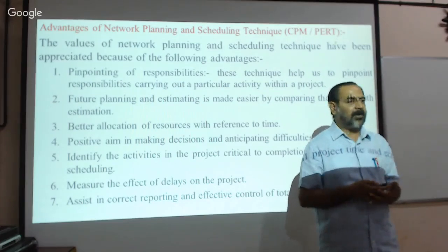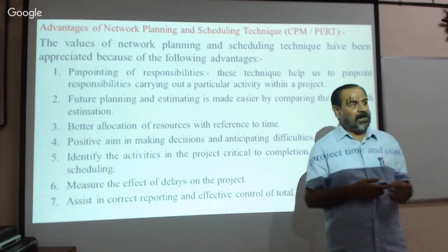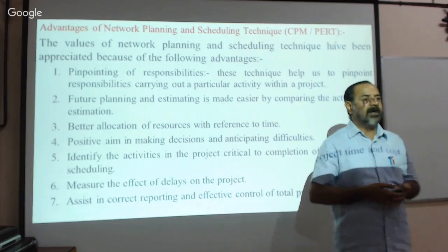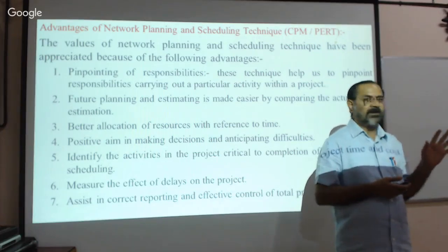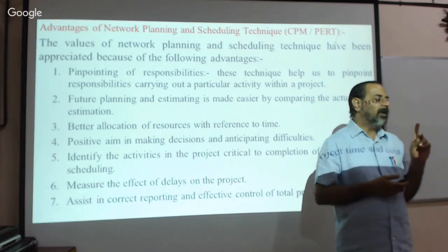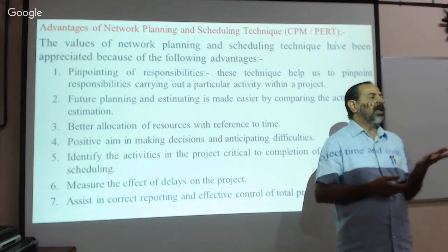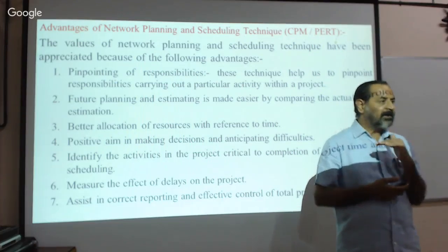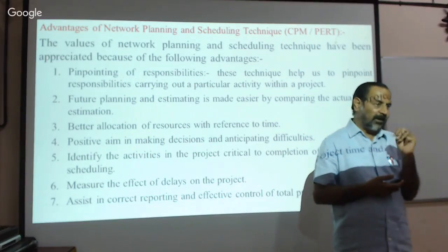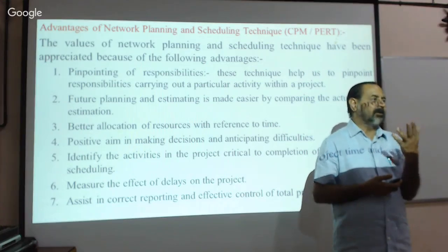Cross check. Okay, that you can do it. This is the one best technique applied in all the projects, mainly in civil engineering projects, isn't it? That is the CPM and PERT. Now remember once again, CPM is critical path method, where the time is estimated one time, the time allotted. Whereas in PERT, the time estimation is considered 3 times, because it is a research level project, research level activity.